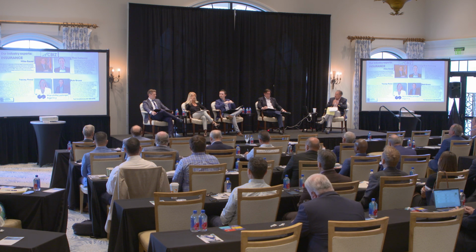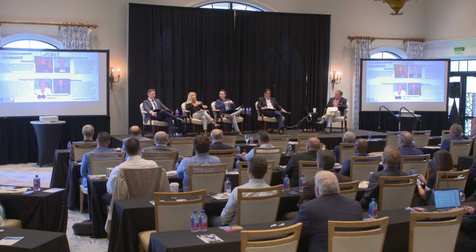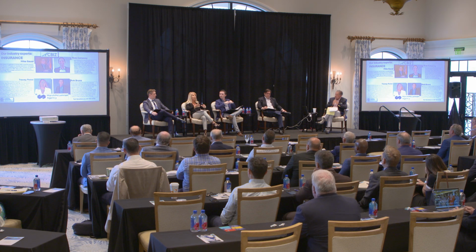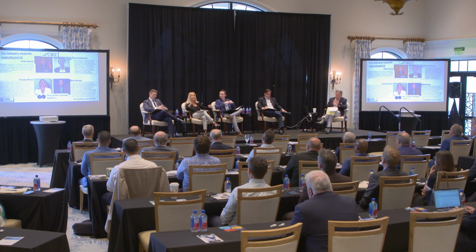So that is a piece that sometimes, when we build our programs with clubs, we make sure and have those discussions. Are you looking at any capital improvements in the next year, 2 years, anything that would be considered more than maintenance? Because depending on size of the project, the GC you hire, who's supposed to insure what, we might also need to discuss an owner's interest policy on the GL outside of your liability for the club.